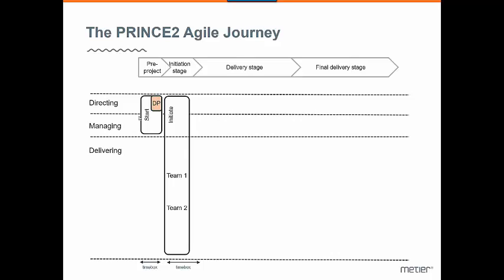Now, the project plan in your initiation stage should build on cadence, right? That's definitely my recommendation. So you want to have stages, and you want to set them on a cadence so that, for instance, every 2 months, every 3 months, every 4 months, we have an end stage. What should the cadence be? Well, somewhere along those timelines I threw out there. 3 months is the rule of thumb recommendation from my part, but it could be that you can do better with 2 months or with 4 months. Shouldn't be much longer than that, and much shorter typically doesn't make sense either, but it all depends.